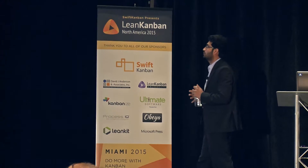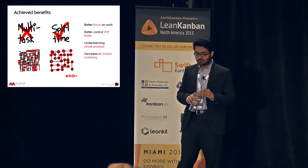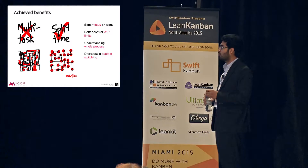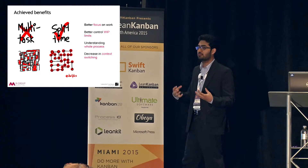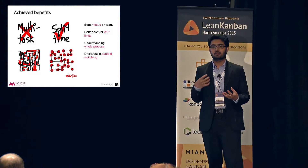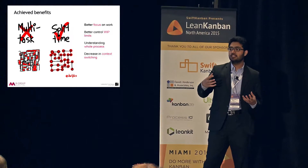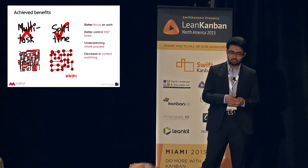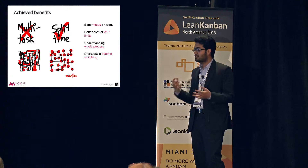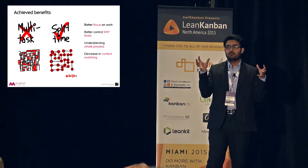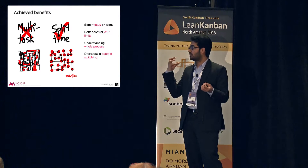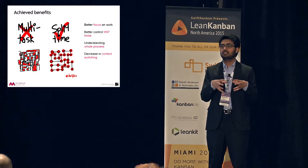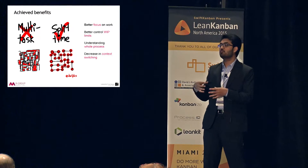The third benefit is that teams became more aware of and focused on the work. Earlier, priorities were constantly changing as senior people or management would keep adding new tasks. With Kanban, there is more focus on understanding the process, and it effectively forced teams to stop switching tasks constantly — implementing a strategy to focus on a task, finish it individually or collectively, and then move on to the next.